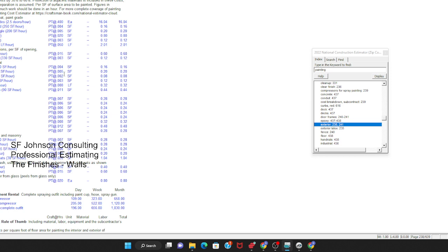And this is based on industry standards, right? This is construction industry standards for painting. And so that labor, write it down, look at it, keep it forever. You got your doors, and then you see siding smooth and siding rough. 0.004 for smooth, 250 square foot per hour, and then for rough or shingle, 200, right?